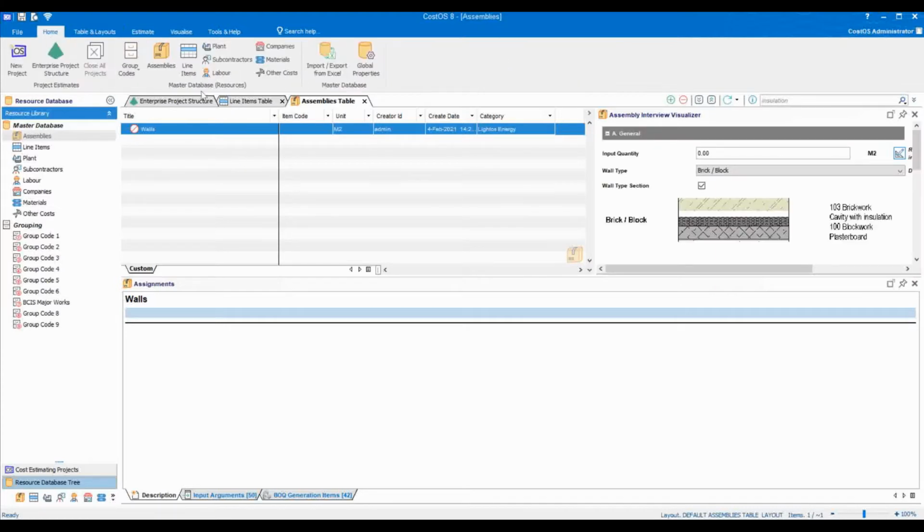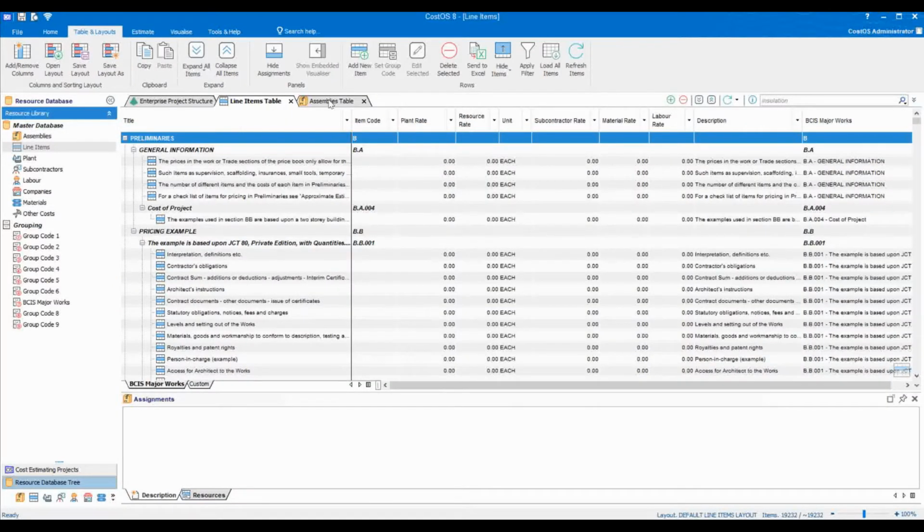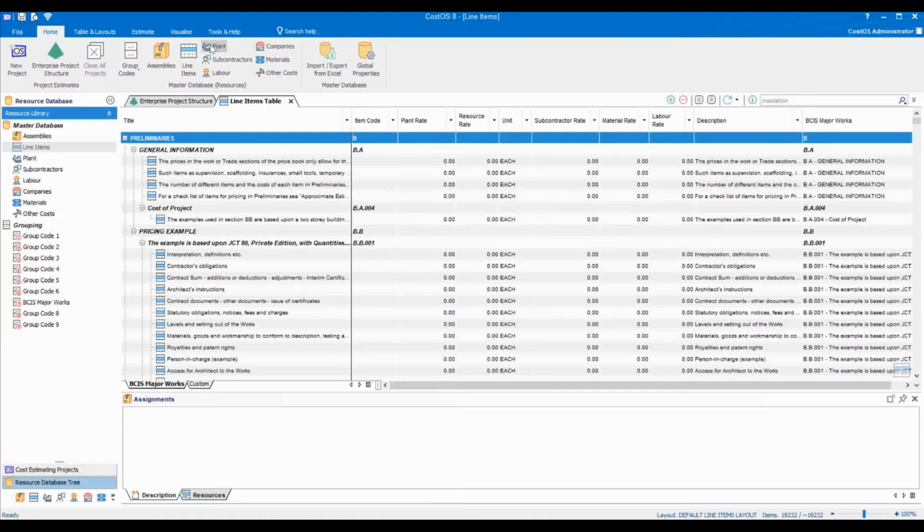And going back, we have our independent sets of line items, and from them, if you bring them up from first principles, you'll have plant, labour, materials, consumables or other costs, actual subcontractors specifically, and the companies I work for.